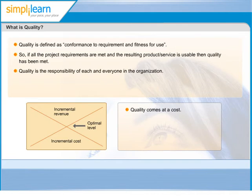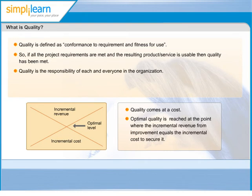It's important to note that quality comes at a cost. The more effort put into ensuring quality, the better the resulting product. But one can't keep investing in increasing quality indefinitely. How much to invest in quality is determined by knowing the optimal level of quality, which is achieved at the point where the incremental revenue from improvements equals the incremental cost to secure it.